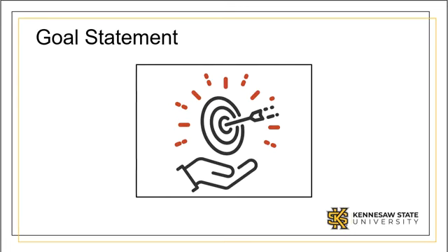The goal statement is conceived and agreed upon by the team and the team champion. Set goals that are SMART: specific, measurable, achievable, relevant, and time-bound. Early in the life of Six Sigma, it was common for projects to extend over months and years. Leaders found that this was an intolerable circumstance for fear that true savings would not manifest itself after substantial investment of resources. Today, projects are typically 4 to 5 months or less and follow a blending of Six Sigma and lean methodologies.